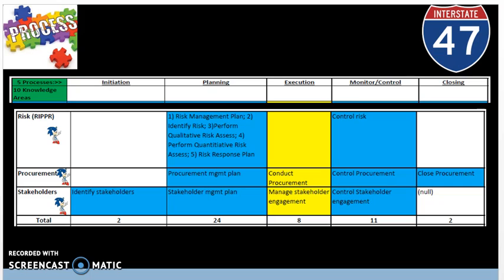After risk planning, the next step as project managers is we need to proactively control risk as much as possible to make sure the project will be completed on time, under budget, and meeting customer expectations or voice of the customer. The process of control risk is the process of implementing the risk response plans, tracking identified risks, monitoring residual risks, identifying new risks, and evaluating risk process effectiveness throughout the project.